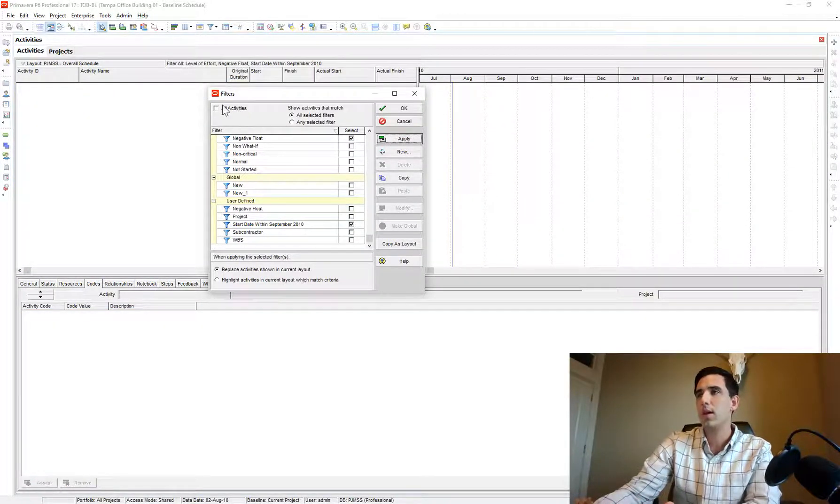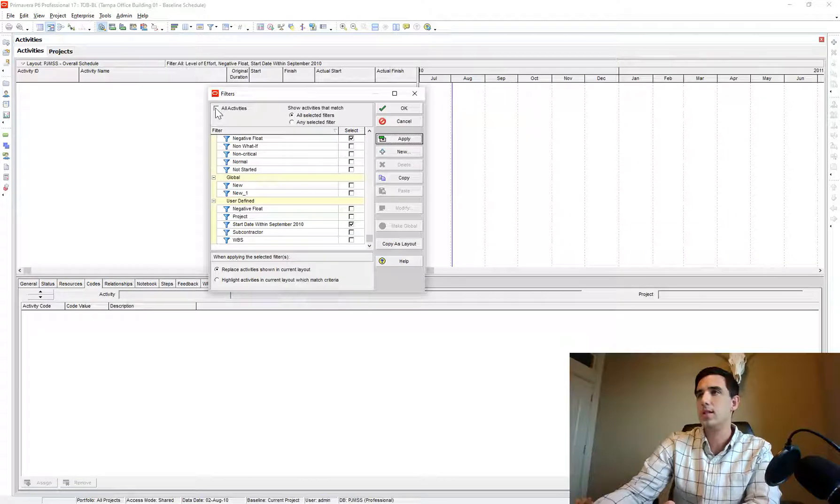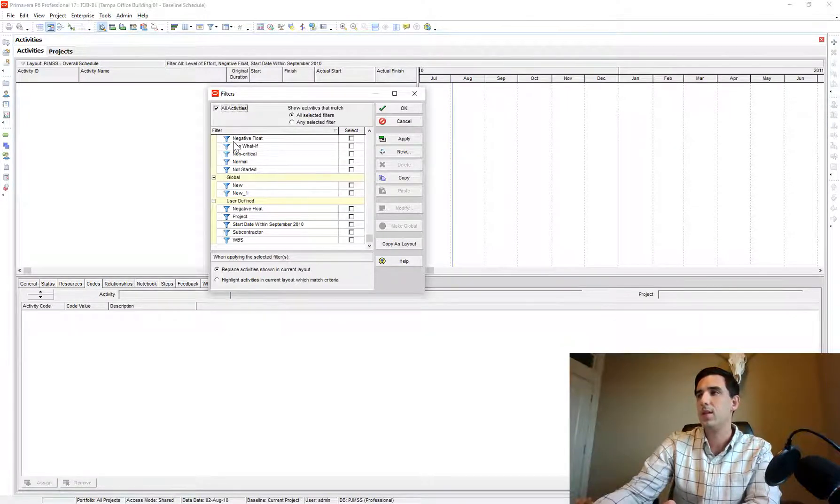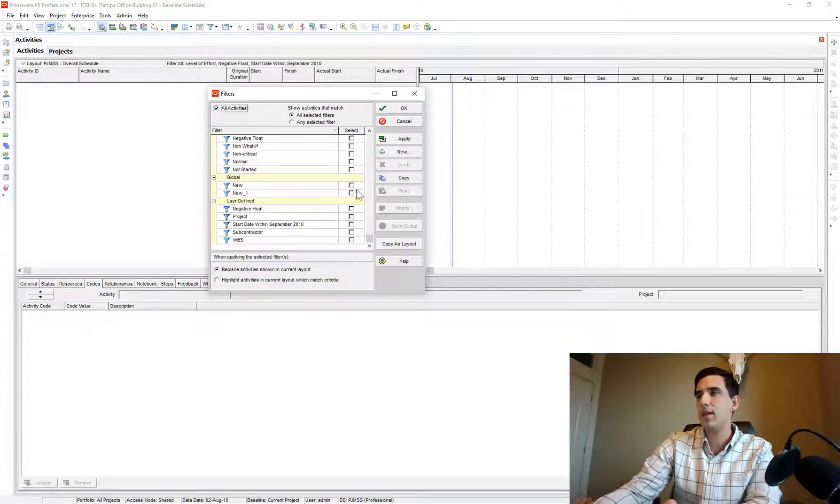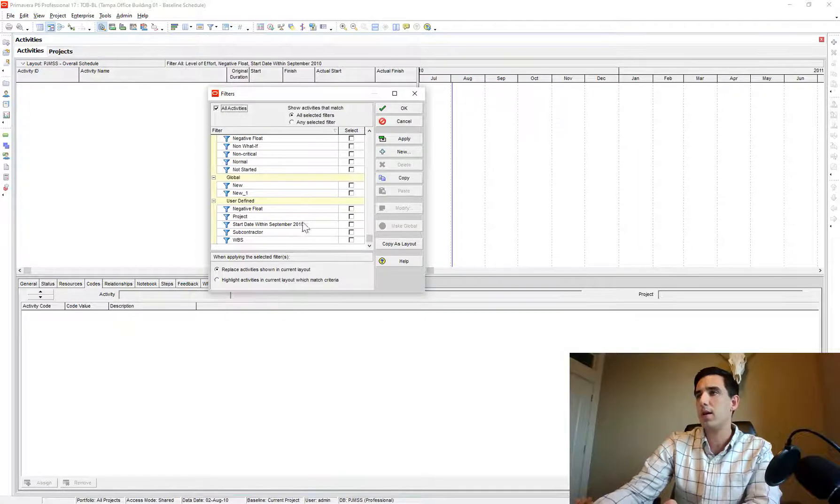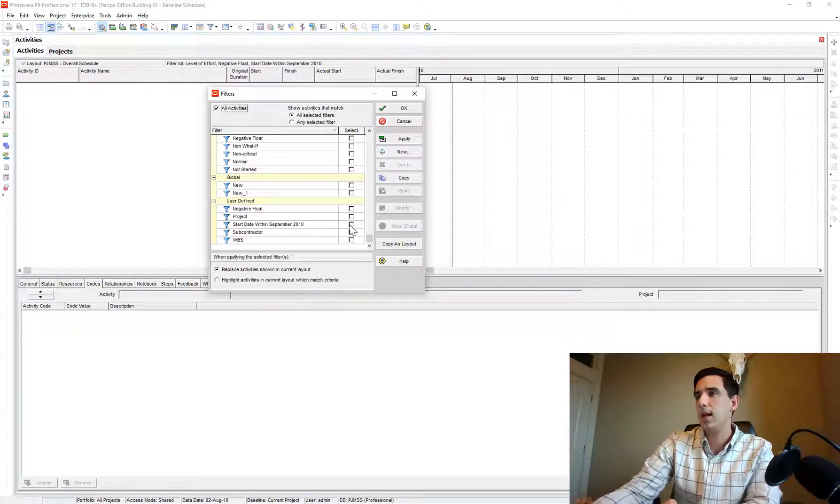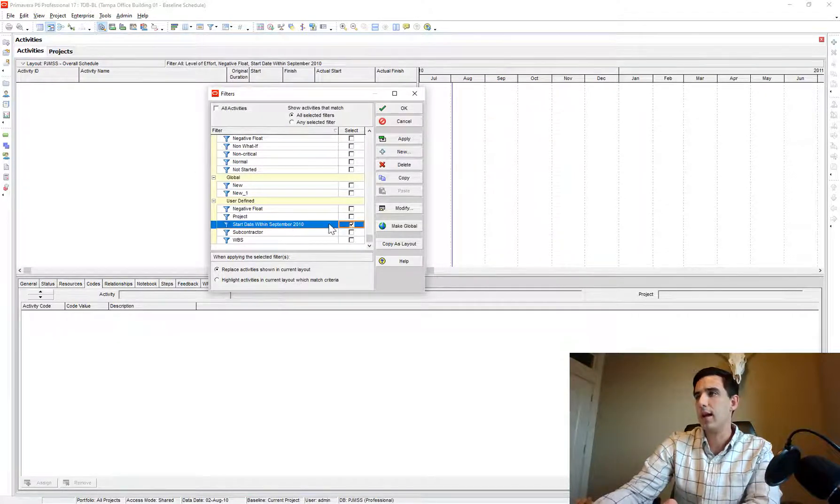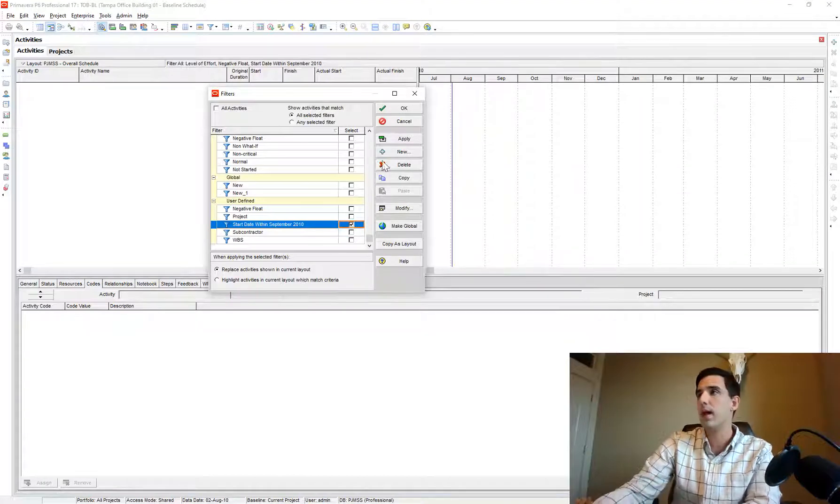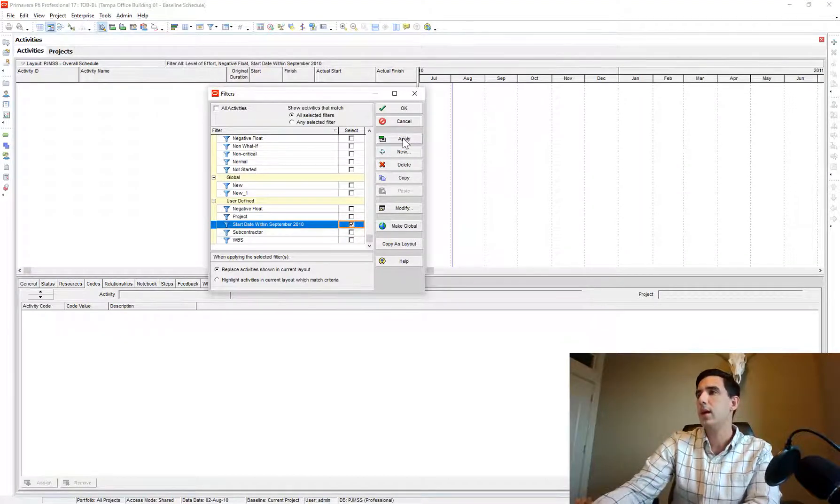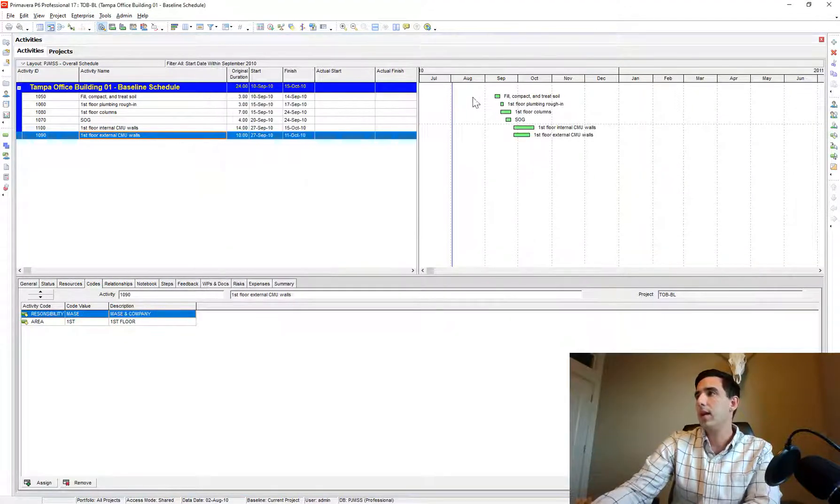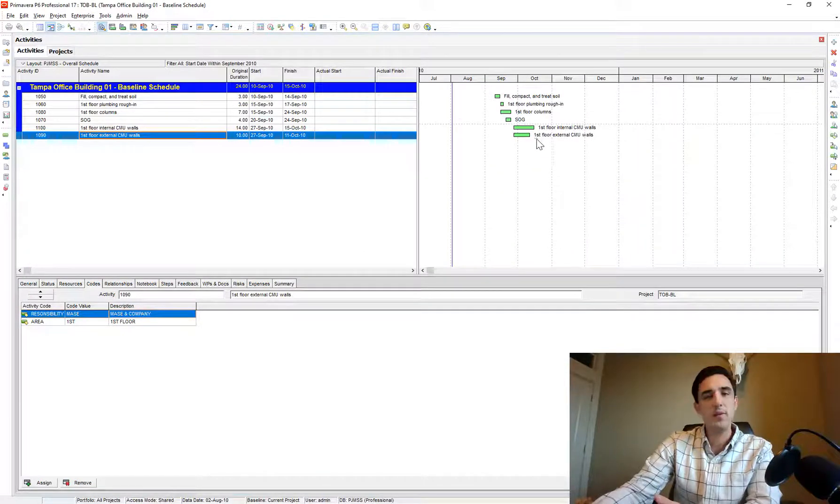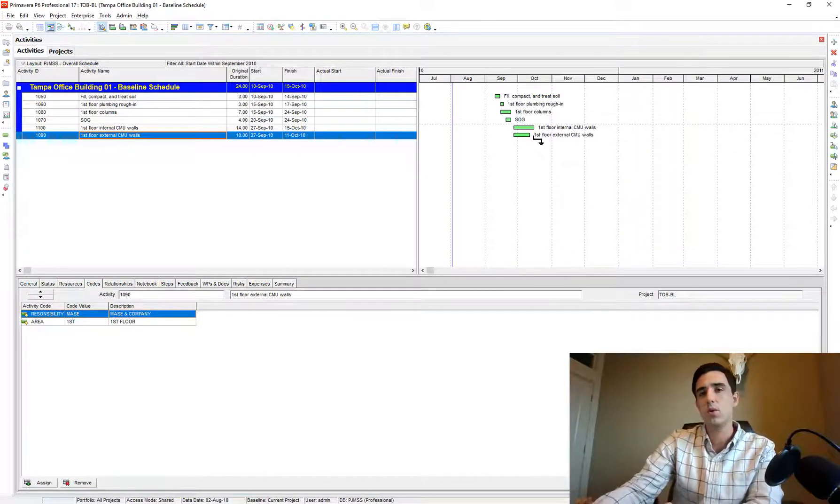One thing I like to do, I just say 'all activities' so that takes off anything that's checkmarked. Then I go back and I click on that start filter, just to make sure I'm only filtered for that one thing. And I'm going to apply that, and there it returns all of the activities that are scheduled to occur within the September 1st to September 30th date.